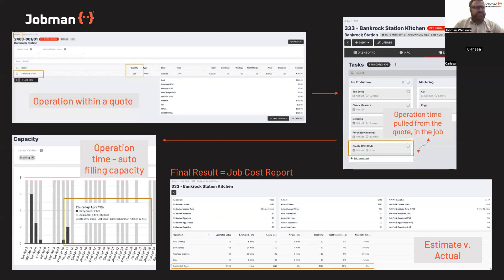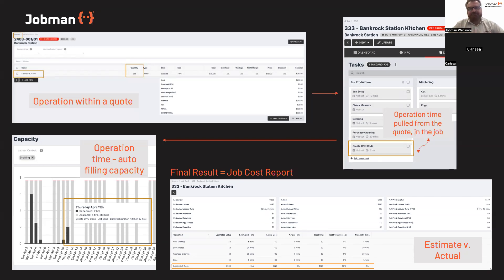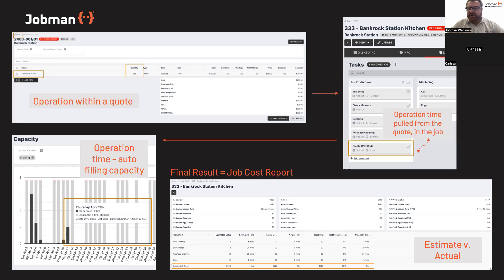When the quote moves forward into an accepted job, those operation times are pulled from the quote into the job. Now instead of talking about estimates, we're talking about actuals. You don't have to do anything — just add that labour time to a quote. That operation time will also start auto-filling up your capacity. Without you really having to do much, the software is doing its job. As you take on more jobs, more leads, and more operational time, it'll start deferring and conferring with the information around your capacity in those operational areas.